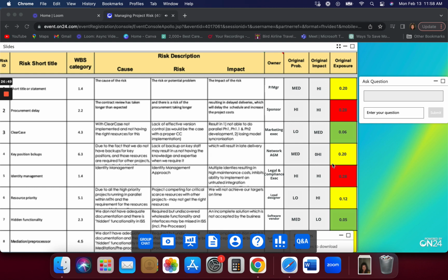In the example that we had here, we had hundreds of risks. And so we had to go through this and find ways to analyze it. And it all starts with this one here. So let's have a look. What do you put in the risk register? The first thing that you put in is we give each one a unique number and a short name so that you don't have to read out the whole meta language every time you refer to it. We put in the risk breakdown structure link because it's so useful for identifying common causes and hotspots.